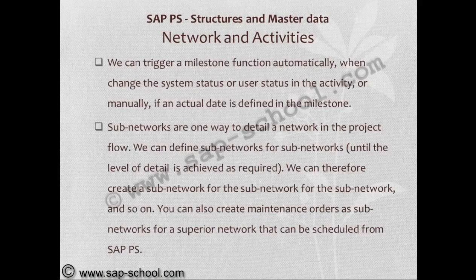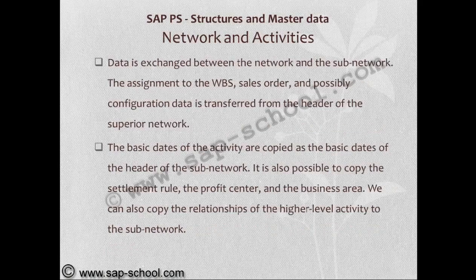If an actual date is defined in the milestone. Subnetworks are one way to detail a network in the project flow. We can define subnetworks for subnetworks until the level of detail is achieved as required. We can therefore create a subnetwork for the subnetwork and so on. We can also create maintenance orders as subnetworks for a superior network that can be scheduled from SAP project system. Data is exchanged between the network and the subnetwork.